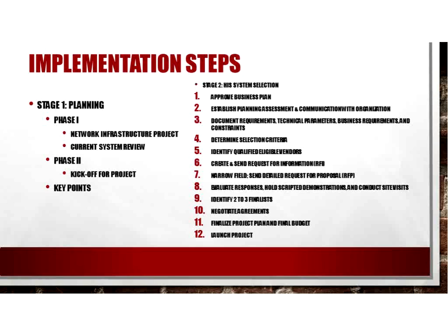which represents commitment. In step 8, we're going to evaluate the RFP responses, narrow the field of vendors, hold scripted demonstrations, and conduct site visits. So this is a very exhaustive process where they're going to compare those 7 to 10 vendors that we chose. They're going to compare them one to one another based on those RFP responses. And then that 7 to 10 vendors that respond to that RFP are going to be narrowed down to 2 or 3 finalists.